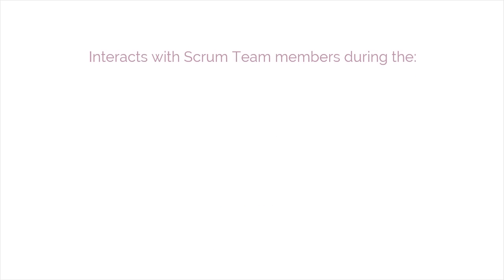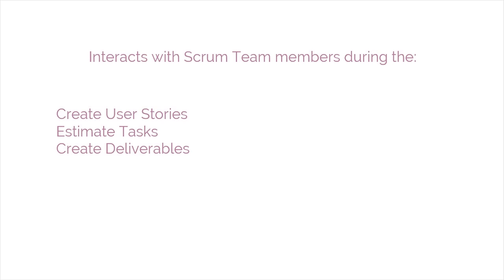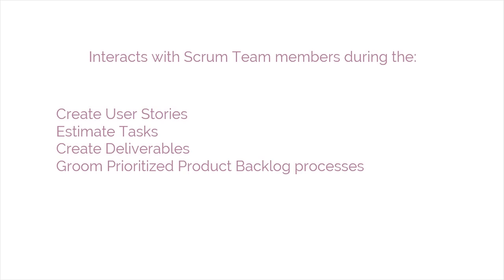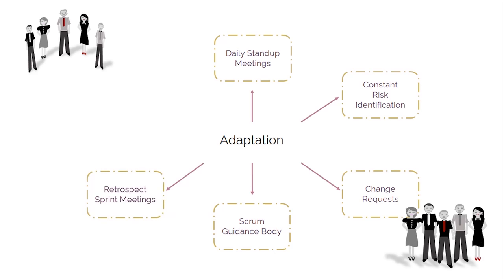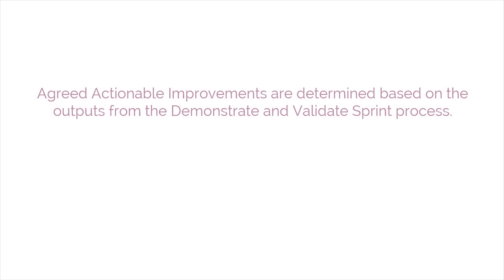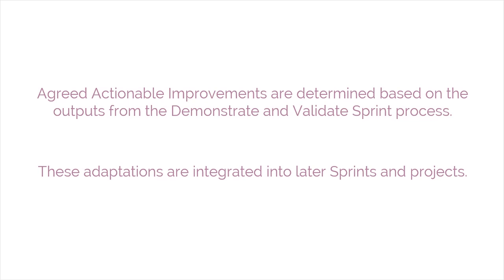The Scrum Guidance Body interacts with Scrum team members during the Create User Stories, Estimate Tasks, Create Deliverables, and Groom Prioritized Product Backlog processes to offer guidance and provide expertise as required for the team to adapt to necessary changes and challenges. In the Retrospect Sprint process, agreed actionable improvements are determined based on the outputs from the Demonstrate and Validate Sprint process. These adaptations are integrated into later sprints and projects.